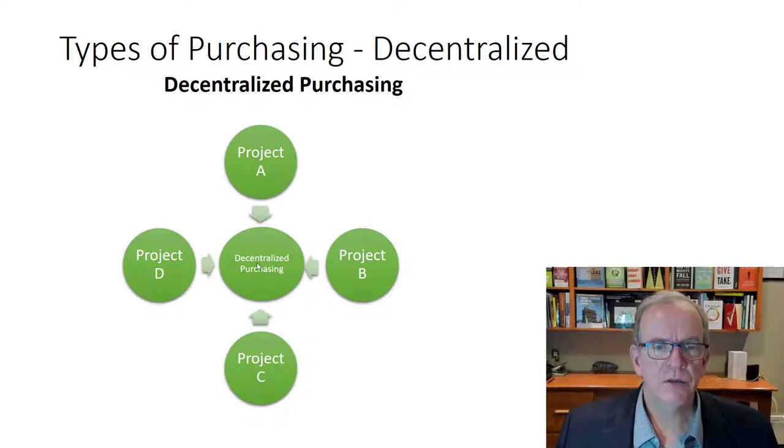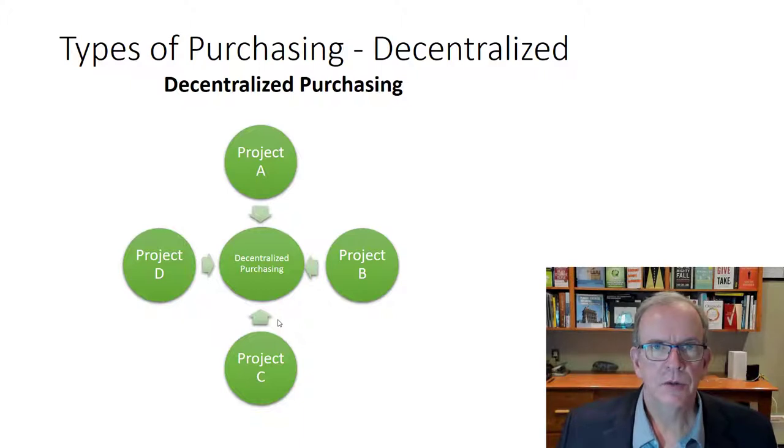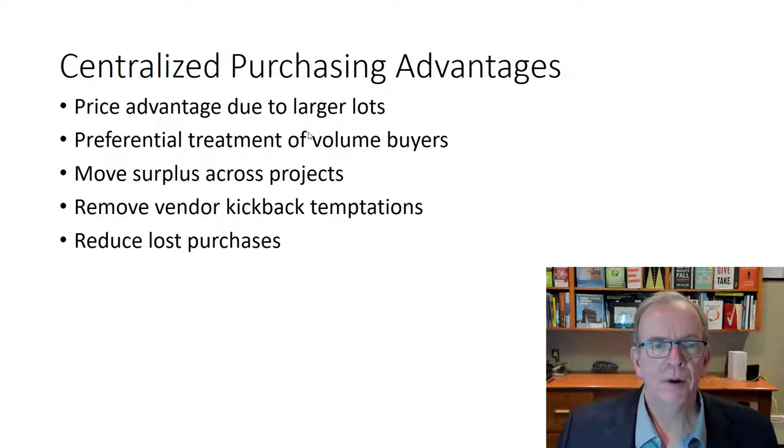Decentralized basically means that at each project, they're making the orders, placing the orders directly with the suppliers. So they're phoning up that particular supplier and working out the delivery there. So you've got one less step in the process, right?